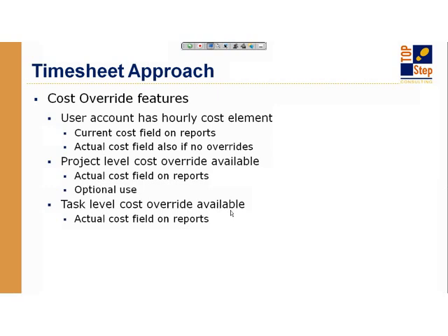Well, of course, on the user record there's a cost field, but actually there's an override feature that you can activate at the project level and even at the task level. So if they're hired to do 2 different jobs on the same project that are different costs, you can override their cost on the project to say, but on this project or on this task, the cost to me is 75 if they're doing copywriting. It's 105 if they're doing project management. It's $10 an hour if they're doing documentation. Just whatever the charge is that's variable based on their role or activity, you can do that with the cost override features. And then of course, since it attaches itself to the timesheet, you actually have the ability to record cost very accurately against your projects.